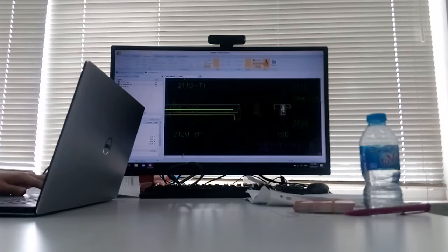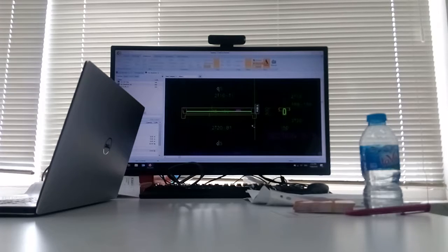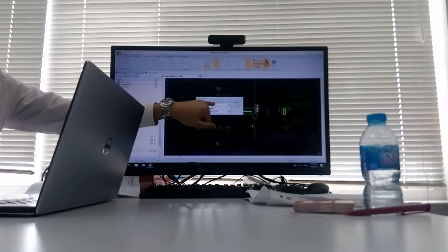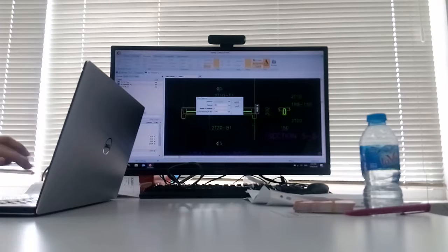Then without selecting anything, go directly to the rebar length. I just highlight the length. Once I complete this, I press enter. You see, the software will give you the distance based on the length, here it is 2700. Once I key in the spacing 150, the number in the distance will come up automatically.